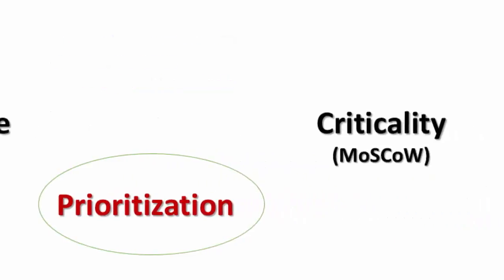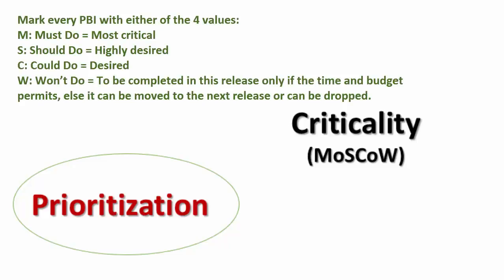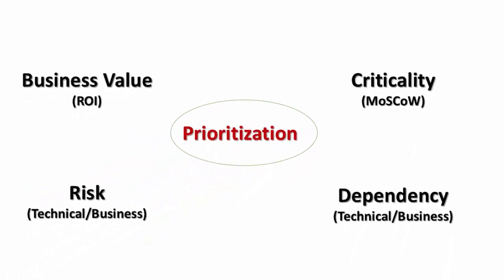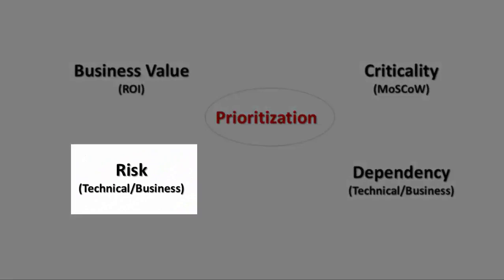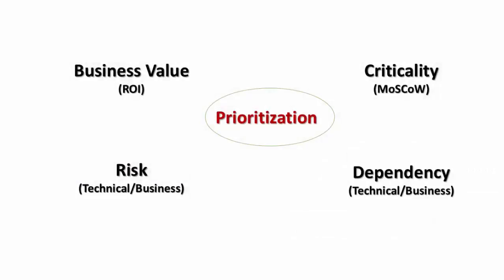Next, you also need to tell us their criticalities. Mark every PBI with one of four values: Must do (most critical), Should do (highly desired), Could do (desired), or Won't do. Won't do means these items are completed in the release only if time and budget permits; otherwise they can be moved to the next release or dropped. This technique is called the MoSCoW technique. We then add two more parameters: risk from a development perspective and technical dependencies. Taking all these factors into consideration, we prioritize.